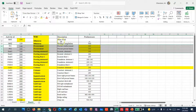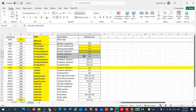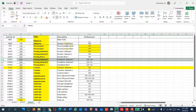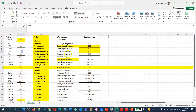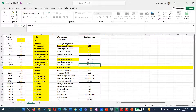After the milestones you have procurement and excavation of abutment one, which needs to start once 'Start Work' is complete. If you are working with one crew, you finish excavation of abutment one, then go to abutment two, then bent one. But if you have multiple crews and multiple excavators, you can start all at the same time. For foundations, abutment one needs the rebar and the excavation to be complete before doing the footing — same logic applies for abutment two.